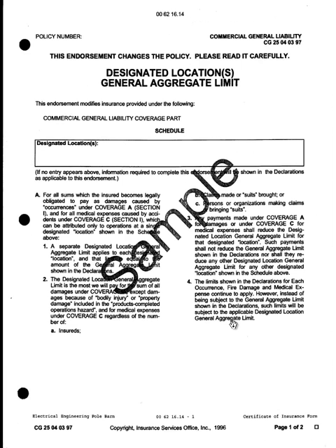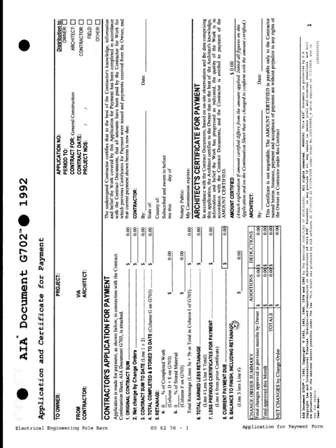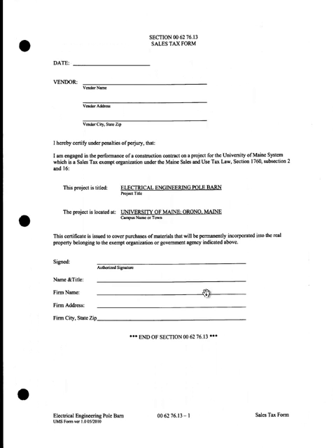More insurance, more AIA documents, some schedule of values we use when they're looking for payments. Again, this would be their request for payment form from AIA, where they have to put in the full bond, how much it's there now, how much retainage they're taking out, what they want us to pay, and we'll sign off on that if it's correct and get them paid.